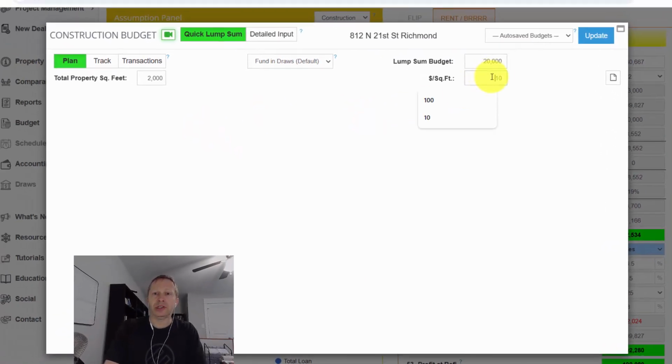And very simply, we can just say it's going to cost me $140 a foot to build, including soft costs and hard costs. This is right in line with what we're paying to build these things, and we're in a kind of a middle tier market, not too high, not too low, kind of Goldilocks. So for a duplex that's built by residential code, this is a pretty safe assumption. $140 a foot to build something with nice finishes, granite quartz countertops, stainless steel appliances, hardwood floors.